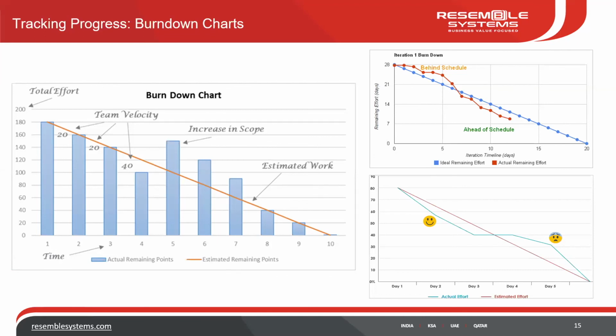Ideally, see, in real time, if we have to speak very honestly, the team will not be able to give the exact number of story points, right? They will take some time. They will take maybe 1 sprint, 2 sprints, 3 sprints to actually understand the requirement. And generally, across companies following agile, teams take 2 to 3 sprints to start estimating in a very clear way, right? Because it's natural. Even though you're doing relative estimation, you might be wrong somewhere. So it takes about 1 or 2 sprints for the team to understand, okay, yeah, I think we are all together in this. We all understand this together equally, somewhere very close, not too much difference, right? So how do we track this?